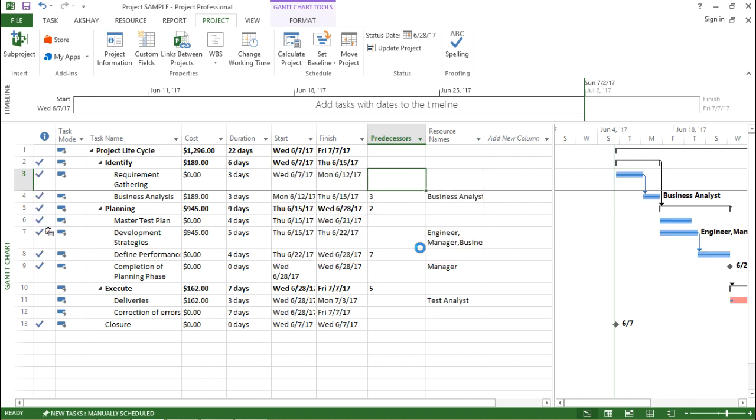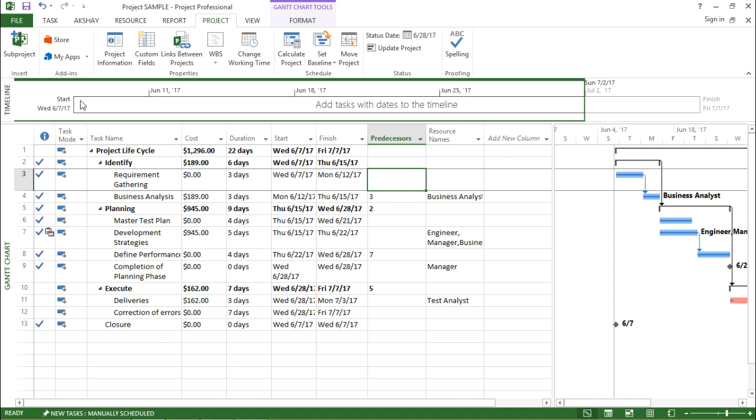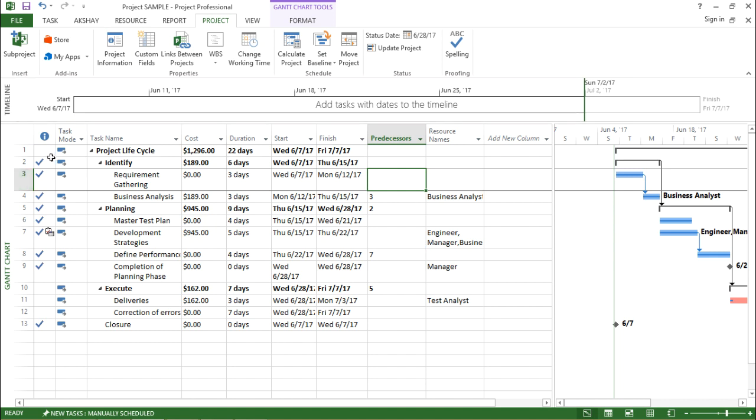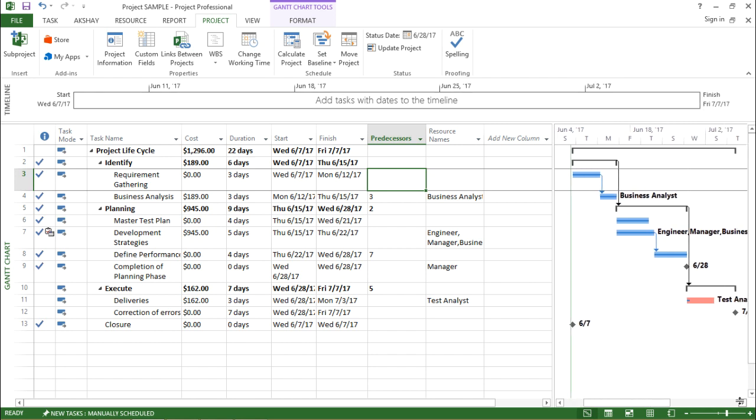The moment I hit OK, if you see on my left hand side I see checkboxes everywhere, that is tick marks everywhere. That means that particular task has been successfully completed till today's date. Today's date being 28th, this has marked only till 28th. The completion of the task is only till 28th of June.